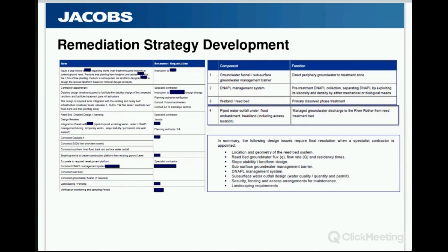What is then required is almost to break that preferred remediation option down into a bill of quantities. Rather like you may do with the site investigation, once the design is constructed, you break it down to a bill of quantities and itemize all of the work packages that need to be undertaken and allocate a resource or an organization that needs to manage or design that particular item.